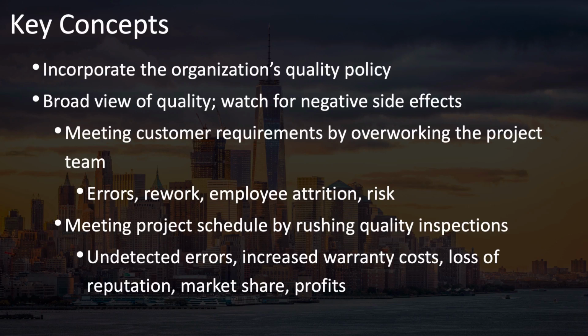Also watch out for and have mechanisms in place to prevent quality processes, such as inspections, from being rushed in an effort to meet the project schedule. This will only result in undetected errors that are then discovered by the customer, increasing your warranty costs, damaging your organization's reputation, reducing market share, and impacting long-term profitability, and even, perhaps, the viability of your organization.